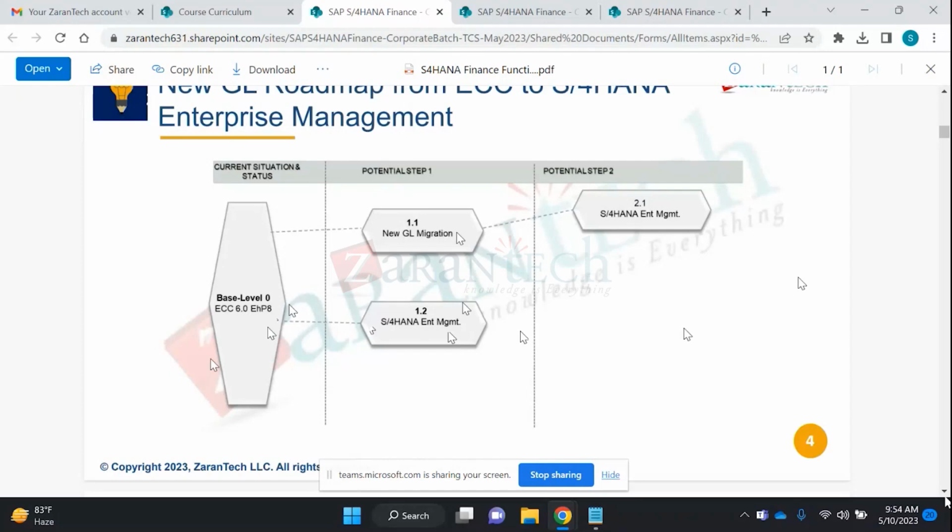And once we have done the migration, then in SAP S4HANA, there is new functionality from 1709 onwards, which stands for subsequent implementation of document splitting. That subsequent implementation of document splitting is a separate project. It is also a 3 to 4 month project, so you can do it thereafter. The benefit is that we can save time here, because if I go with the first option, it's a 2-year journey. But with this option, I can do both projects within a year.